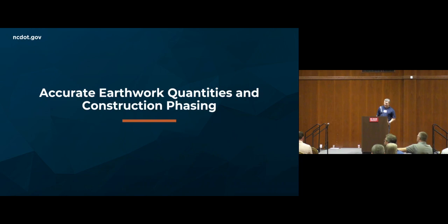Another one that I'm sure some of you have dealt with in the past is, especially in the urban areas, it seems like we have a lot of interchange reconstruction projects, or anything with complicated phasing on very busy interchanges where you're reconstructing ramps. It's making sure that the earthwork is compiled not in totality for the project, but that it's actually broken out for the phasing.